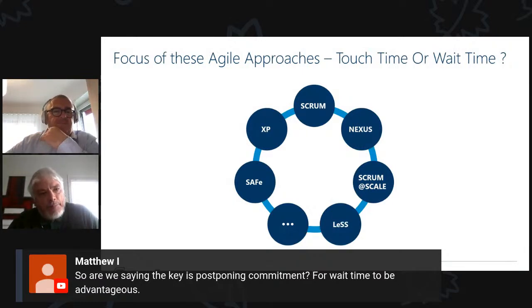And this is what people don't understand: you can make a lot of money just reducing wait time and not changing anything as to how you do things. Touch time is basically saying, how do you do things? We're going to change it. But that only matters at the constraint. It doesn't matter anywhere else. And these guys go on touch time everywhere, all the time. And what they do is increase the overhead cost, layers, overhead, layers, and basically you sink. Because you've got to maintain these improvements that don't impact the constraint. Operationally, you've got to maintain them every month. So you're sinking and sinking and sinking.